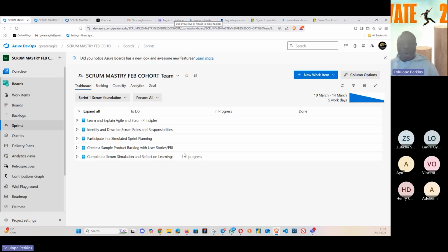If we talk about a sprint of 2 weeks, the time box is 1 hour for the sprint review. Are you sure? Yeah, I'm sure it's 1 hour. So for a sprint of 1 week, it will be 30 minutes. If we divide, that's the ratio.